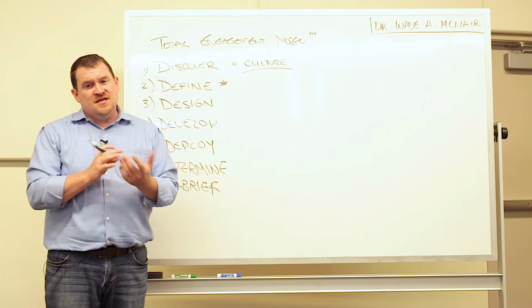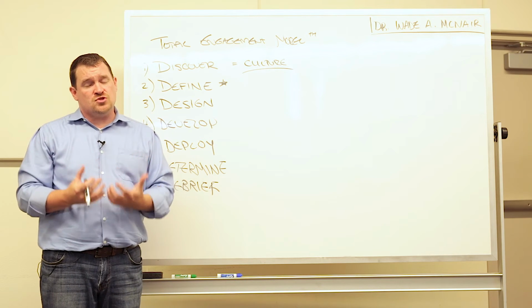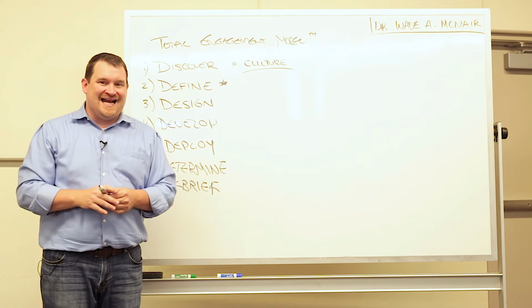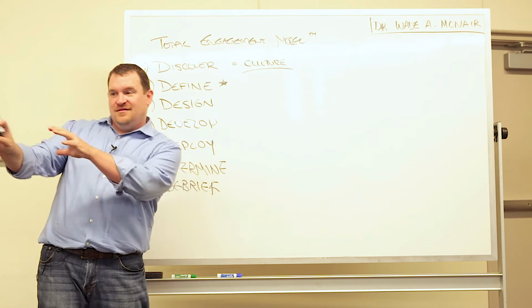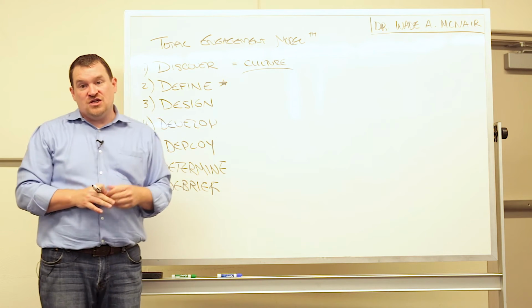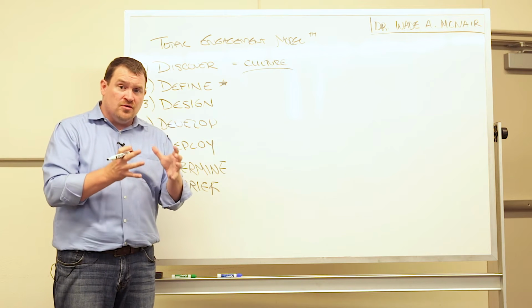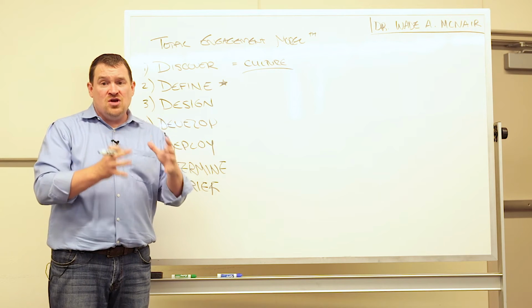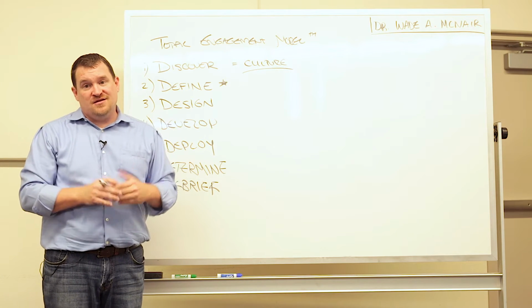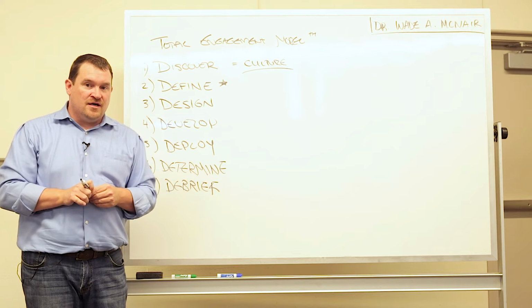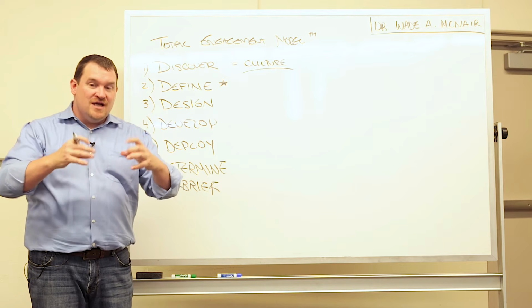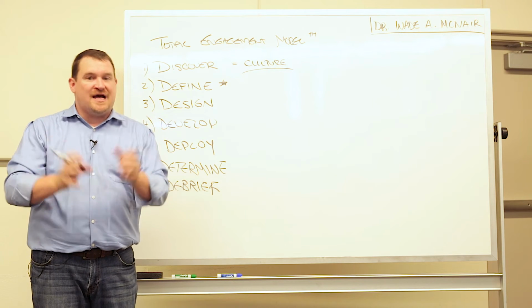Inside organizations, this is an area where internal consultants struggle. They struggle because it could have just been an email that was sent: "Hey, I think we should update this." And now that becomes this area of definition. One of the largest challenges internal consultants suffer is not effectively documenting the scope of a project, being able to clearly define the outcomes, and, once those outcomes are defined, continuing to keep accountability with those outcomes.